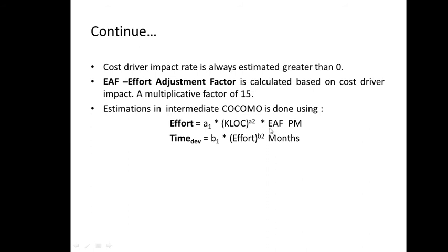Say I have been provided with cost driver 1 value is 2, cost driver 2 the value is 1, cost driver 3 the value is 6. Likewise, we can have values of each cost driver if it is given in the question. So simply you have to take the summation here and write those values, right? If any value is not given, it is assumed to be 1. EAF will be simply 1 if anything is not given in the question. Okay? So now we have considered those cost drivers here along with the size to get the effort.